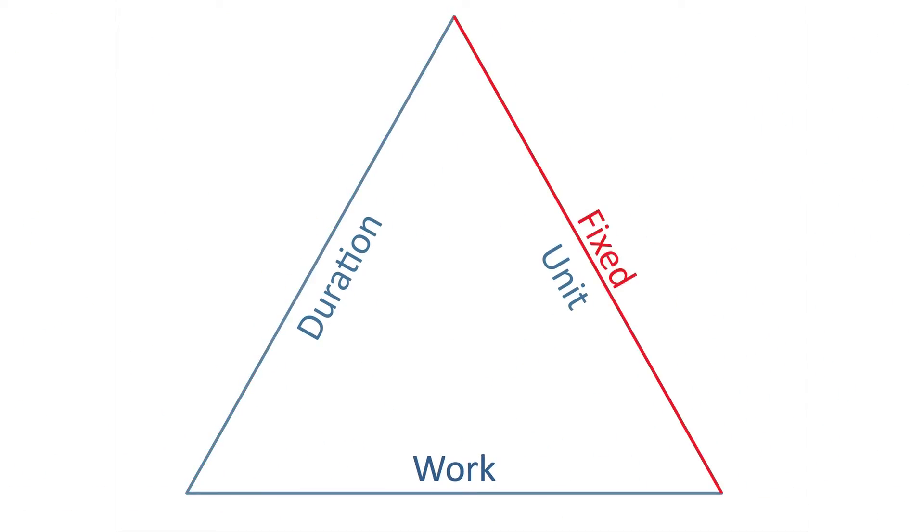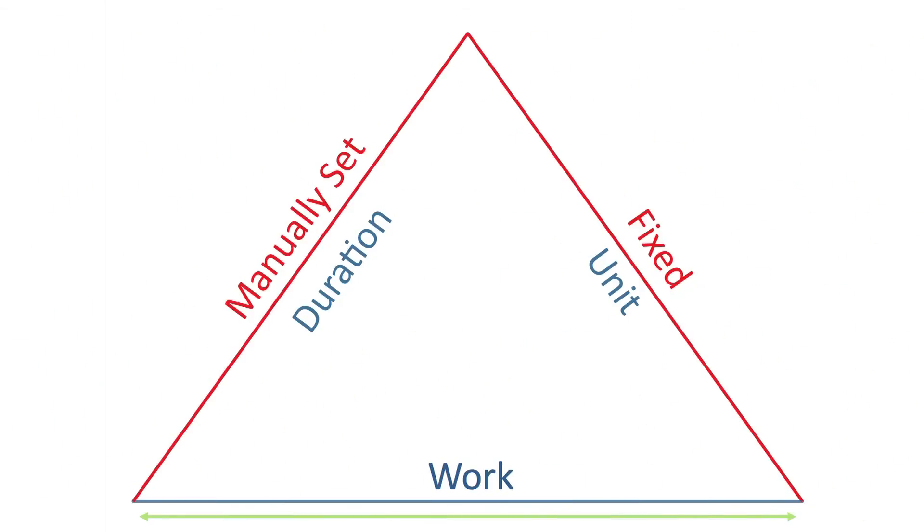Depending on the selected work policy, Clarison will maintain the side of the triangle that the user has set as fixed. In addition, the user can decide to manually set an additional side, so Clarison will be forced to automatically calculate the third side of the triangle.